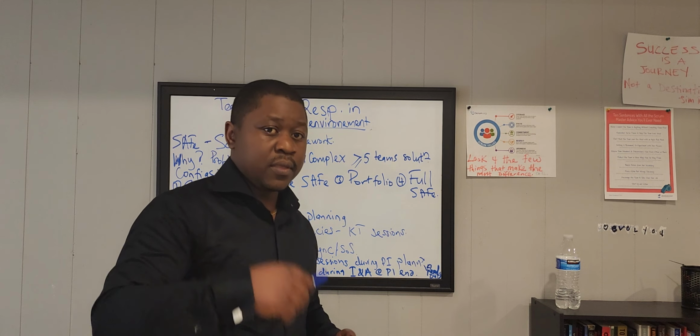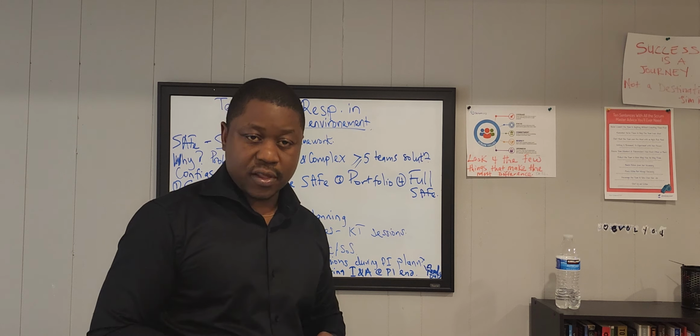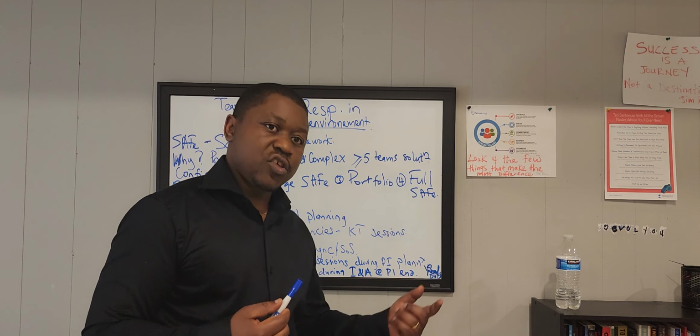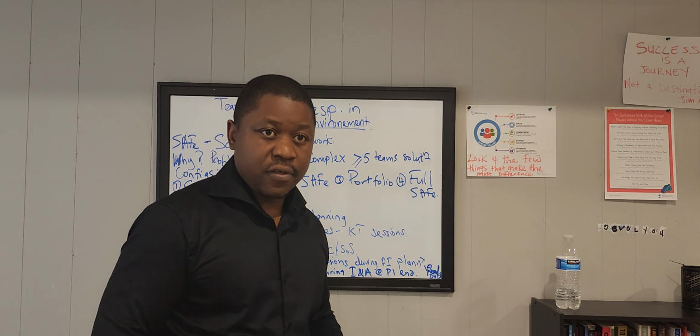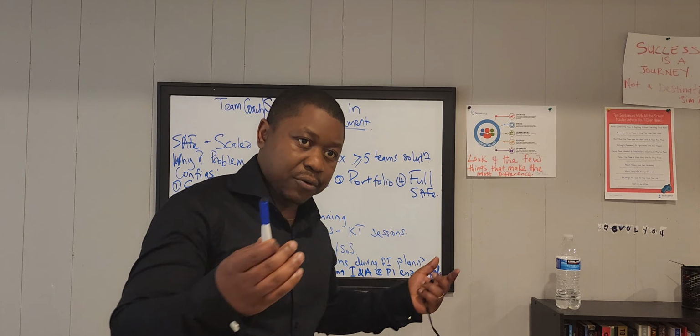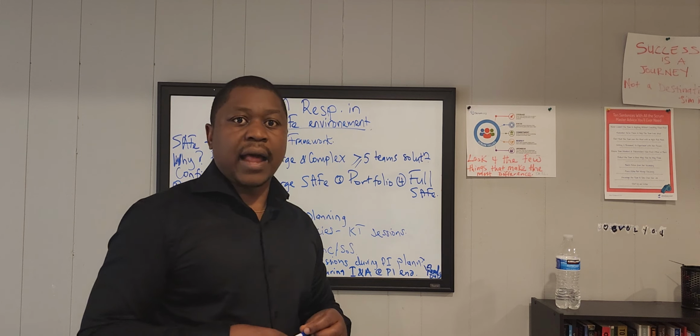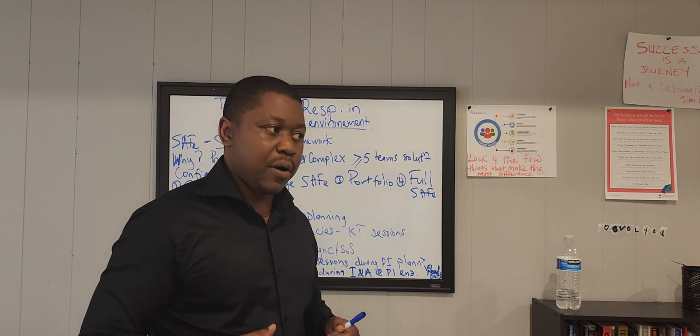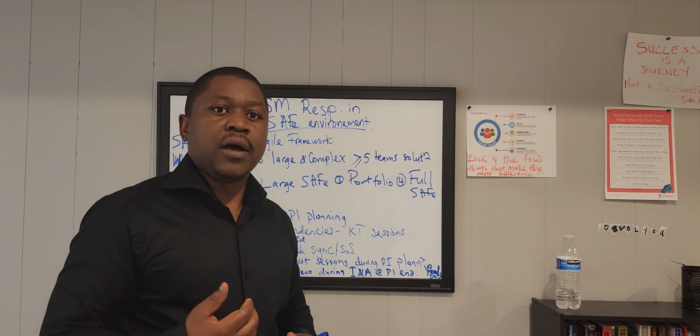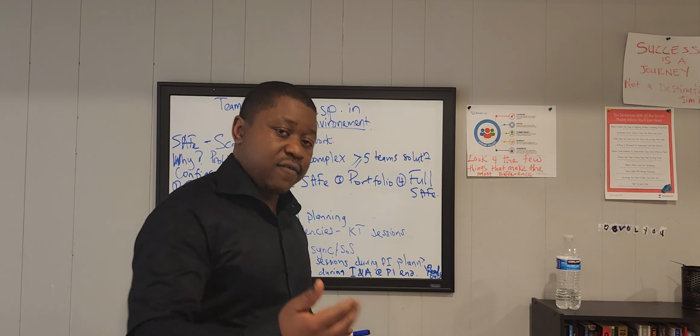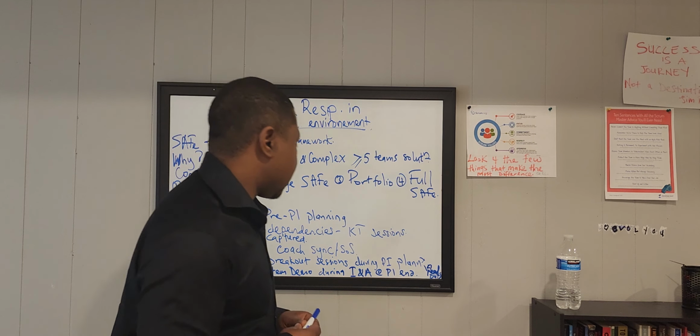So on the second day we do the readouts, and I make sure that an engineer, or sometimes I do it myself, we do the readouts, we call out all our PI objectives and our dependencies and our confidence vote on how confident we are that we're going to achieve those objectives.